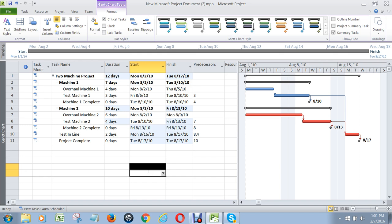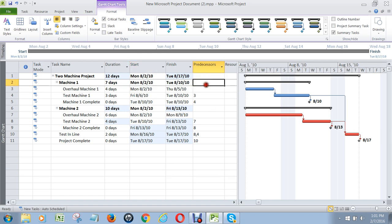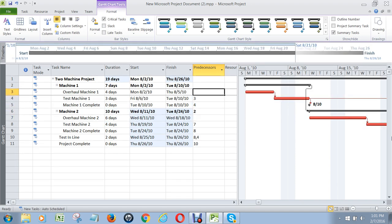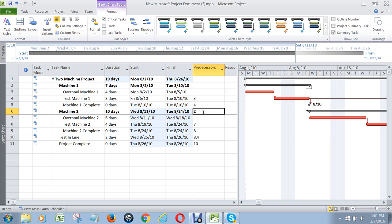Now I want to go over a couple mistakes that people make as well. Number one is they do link up summary tasks. They might say, well, I can't start on machine 2 until I'm done machine 1, so I'm going to put a two here. See how that created a line? That adds nothing to the schedule because what makes the summary task is the tasks under it. So you shouldn't do that — take it off.